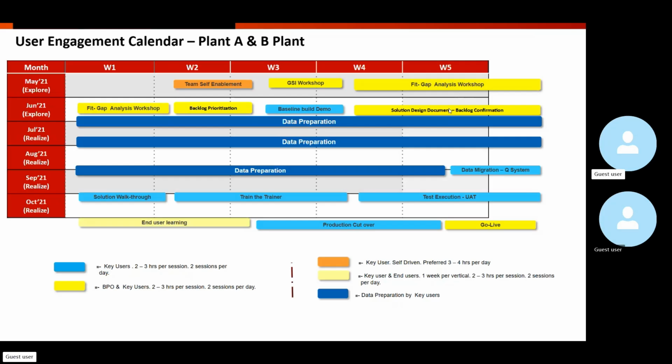A vendor can give you a demo before implementation to impress you with the product and to get the project. This is demo number one. Demo number two is I've collected the requirements, I have configured the system. I will showcase the demo to you so that you will understand whatever you gave me as requirements is there in the system, which is basically the solution walkthrough. It's a demo of your solution. That happens during execution. After completion, the key users can give training to the end users, that again will become a demonstration, a training session. So there are three phases.